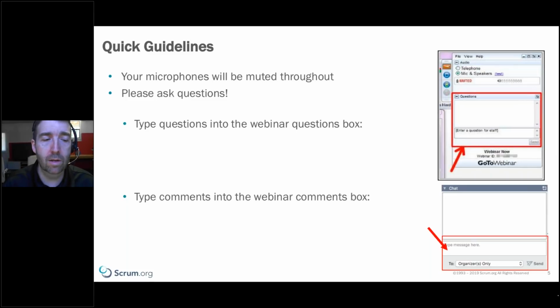requirement at that moment, and many times the requirements or acceptance criteria come out in the sprint planning meeting that had not been communicated before, not because they've been withheld, but simply because as the product owner learns more about how something might be executed, he or she also learns more about their needs. And so the common